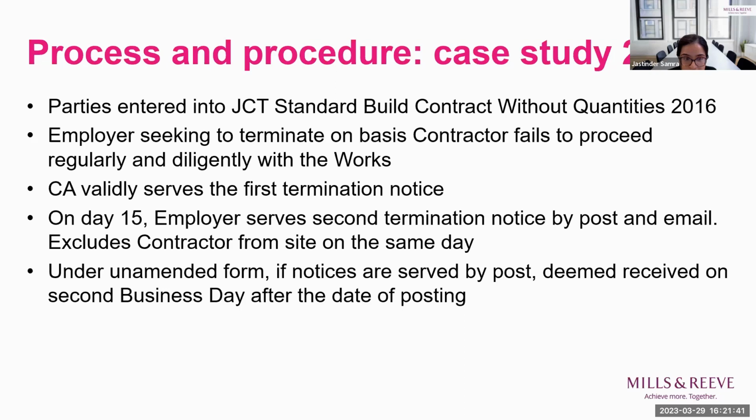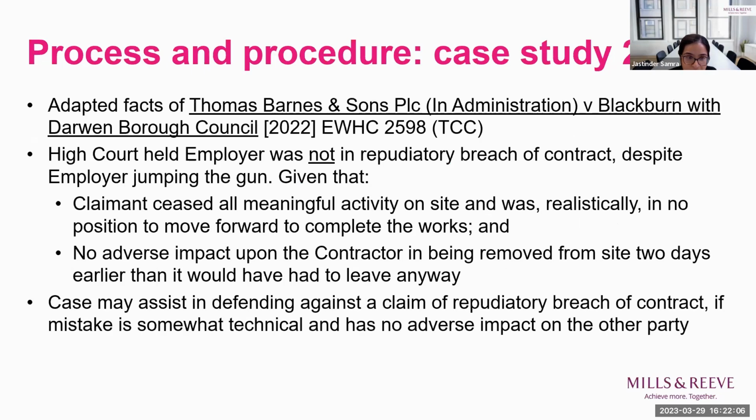It's important to note at this point that under the unamended form, notices cannot be validly served by email. And if notices are served by post, then they are deemed to be received on the second business day after the date of posting. As a result, the employer is therefore putting into effect the second termination notice 2 days before it should have. Just moving on to my next slide,